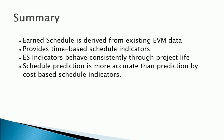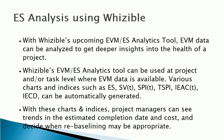To summarize: Earned Schedule is derived from available EVM data. The ES concept provides time-based schedule indicators. ES indicators behave consistently and do not fail for late-finish projects. Schedule prediction is more accurate than prediction by cost-based schedule indicators. With Visible's upcoming EVM and ES analytics tool, EVM data can be analyzed to get deeper insights into the health of a project than traditional EVM analysis. Visible's EVM and ES analytics tool can be used at the project or task level where EVM data is available.